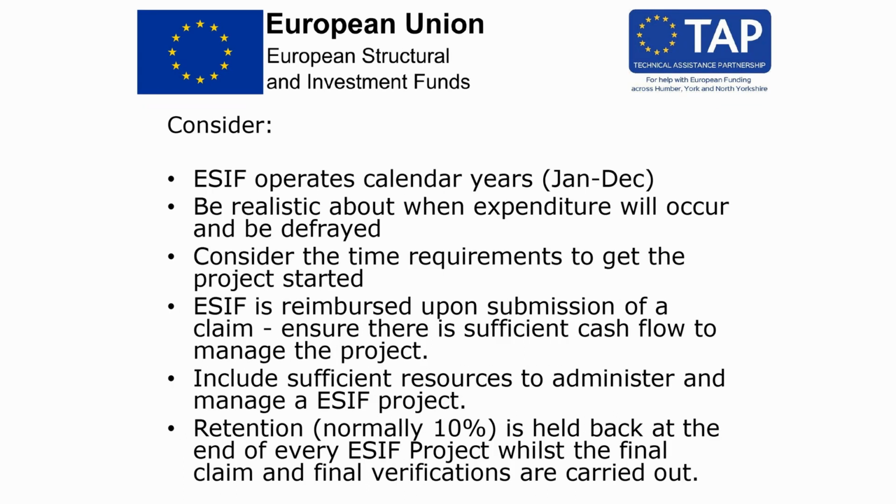Some other things to bear in mind. European structural investment funds operate in calendar years, January to December. Be as realistic as possible about when expenditure will occur and be defrayed. European structural investment funds operate on the basis of defrayed expenditure, i.e. when a payment leaves a project's bank account, not when an invoice or cheque has been written or sent.